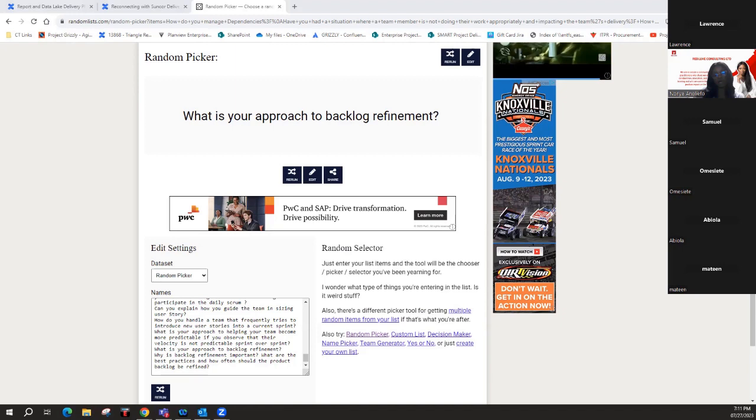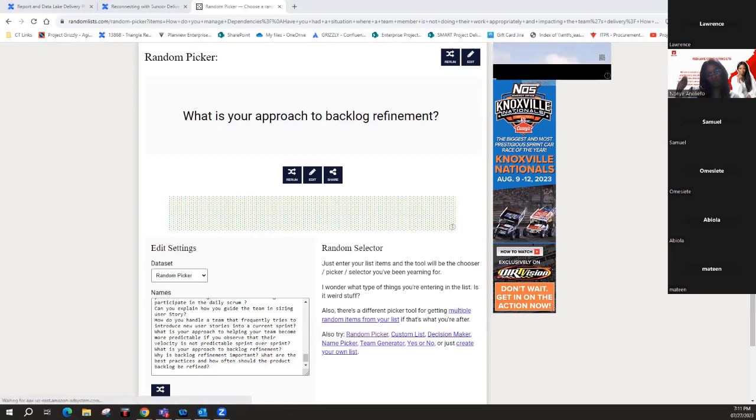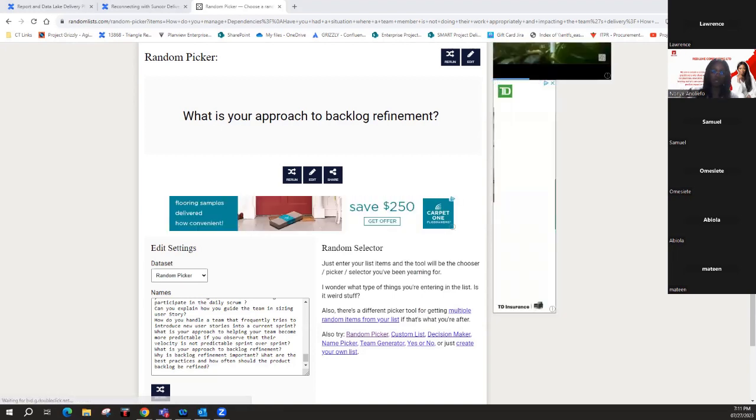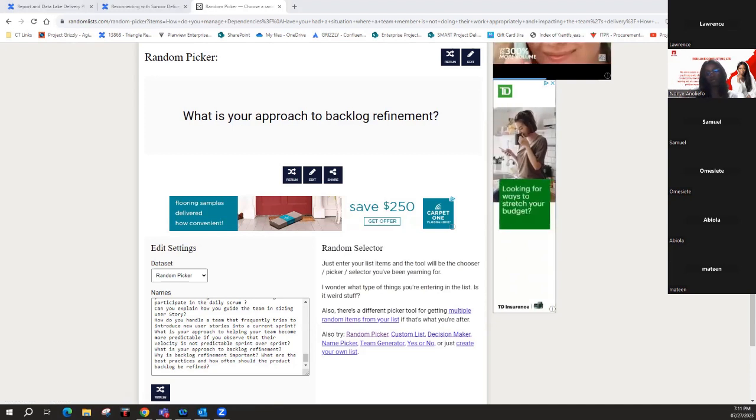And in case we don't complete that exercise during backlog refinement, I just want to also remind the Scrum, I keep on saying Scrum Master, the product owner, to continue refining the user stories offline before the next sprint planning, so that we have user stories that meet our definition of ready ahead of our sprint planning.